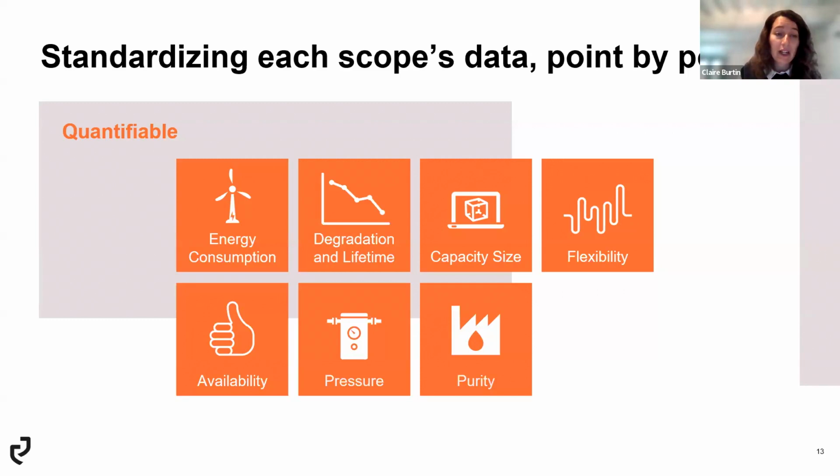For example, for lifetime, in some cases you could have a longer lifetime for electrolyzers. So you can sometimes even avoid replacing the electrolyzer twice during the lifetime of your project. Depending on the lifetime of your project, you can replace just once. And this is going to save you a lot of costs in terms of CapEx, if it's possible.